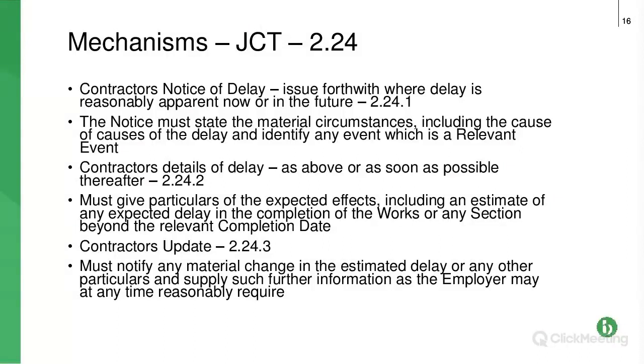So think of this at a high level. As soon as you know you've got a delay, you need to be thinking about notifying. Forget about which contract you're on for 2 seconds. Just think, right, we need to be thinking about notifying. And then start to look at the notice provisions, because you can pretty much guarantee in all construction contracts you are going to need to notify. If you notify and you don't need to, no one's going to penalise you, but you will definitely be penalised if you don't notify, and that means if you don't notify within the timescales, or if you don't provide the right information. So, the odd bullet points are the clause and the timescale.